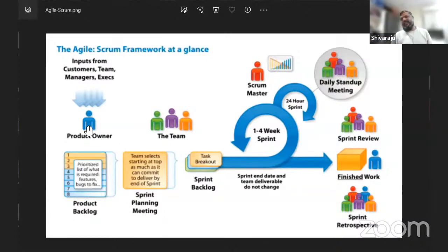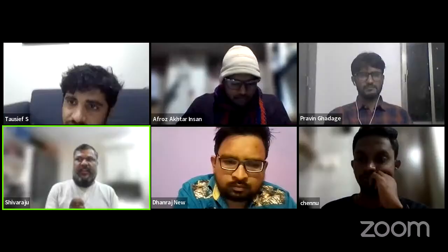So once he has prepared this product backlog, the Scrum Master and product owner will schedule a call to go through these technical requirements, that user story. We don't know, because the product owner is preparing that user story, so he has to explain to the Scrum team what that user story requirement is. For that we will schedule a call which we call the product backlog refinement session.